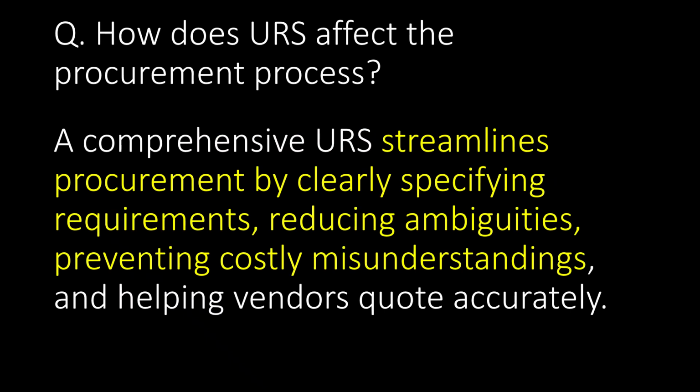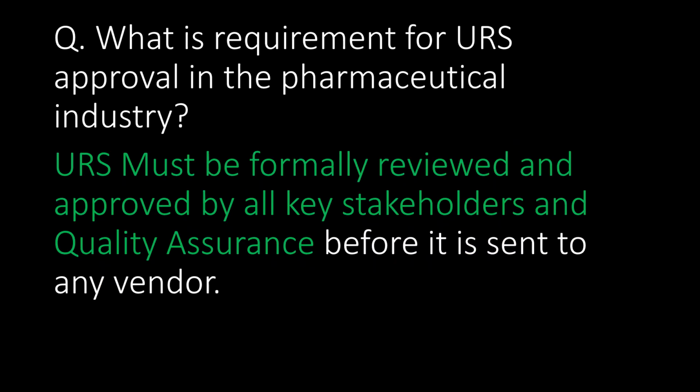How does URS affect the procurement process? A comprehensive URS streamlines procurement by clearly specifying requirements, reducing ambiguities, preventing costly misunderstandings, and helping vendors quote accurately.